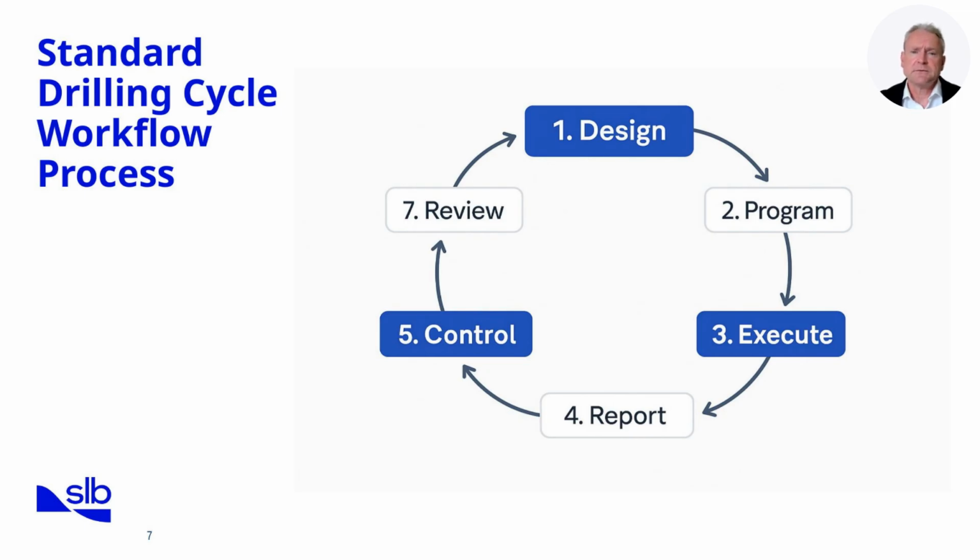Next is program. This is where the engineering design is translated into a detailed drilling program, including operational procedures, equipment requirements, contingency planning, and HSE protocols. This document becomes the instruction manual for the rig site.